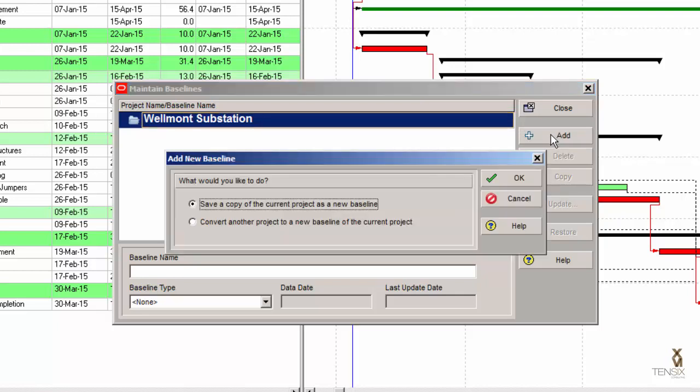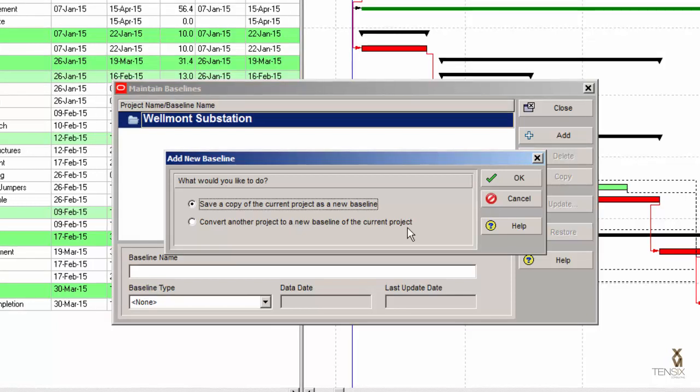If I go with this first option, it's going to save a copy of the project as a new baseline. Literally, it's going to make a complete copy of the entire project in the database, and I can use that as my baseline. This second option is something I will explain a little later in this video. Save a copy of the current project — let's click OK.